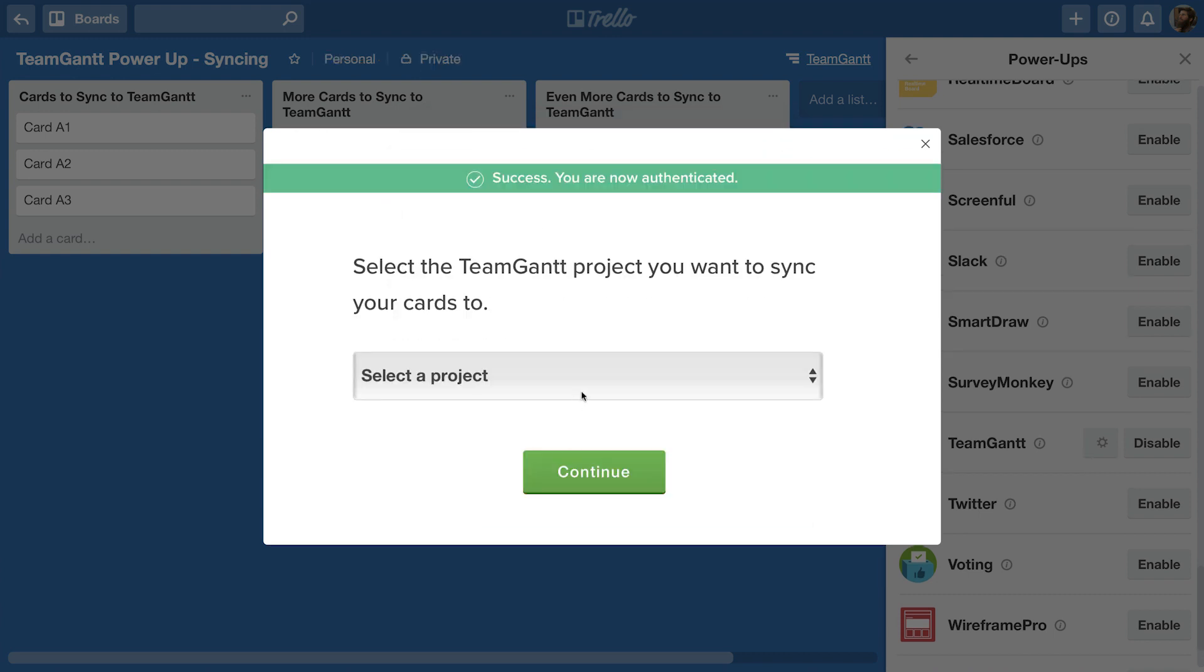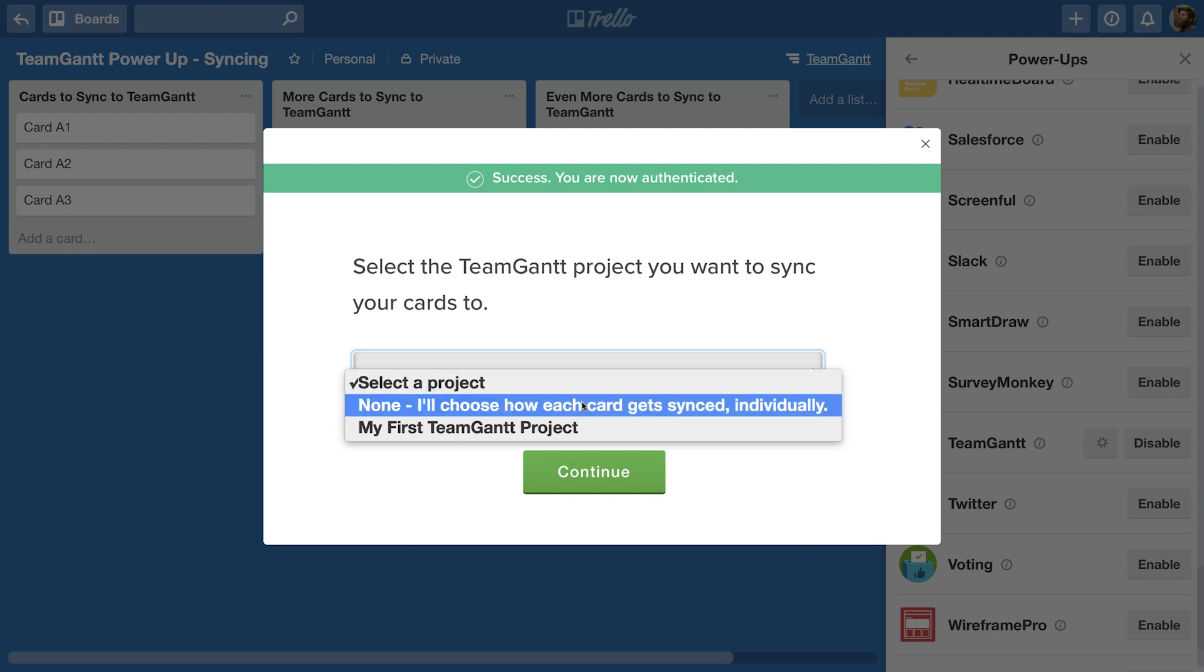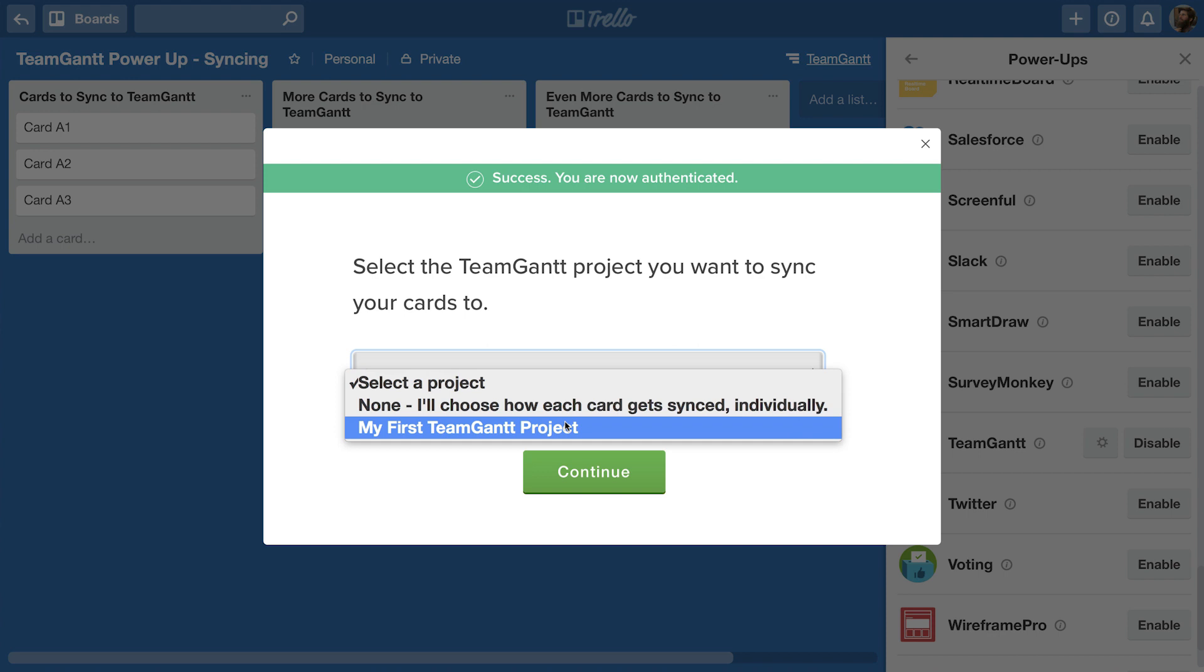You can choose to sync manually which lets you select individual cards to sync to TeamGantt, or you can choose to sync automatically at the board level where all existing and newly created cards on your board are synced to TeamGantt without you lifting a finger.